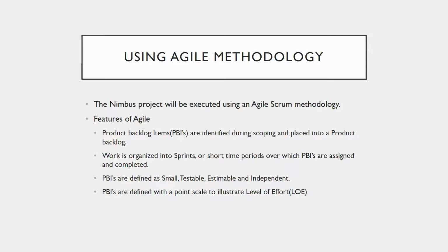When tasks get super large like that, they're usually broken down into epics, which are collections of user stories. But we don't get into that level of detail in this particular project plan because it's not really necessary. This seems like a large project to execute, and it probably is, but my high-level planning of it covers a whole bunch of different platforms, and it's possible that I left things out, but with Agile, it's absolutely normal to leave things out.